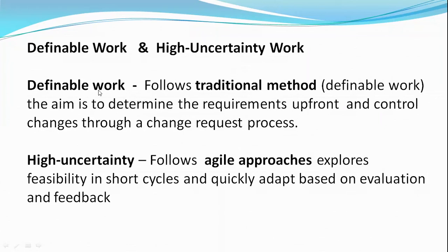So for definable work, I said, when the requirements are very clear, then you are going to go by the traditional method, where you determine the requirements upfront. You know what exactly is required. For example, you're going to construct a house, right? You know the square feet of the house, how many rooms are going to be there, and the size and shape of each of the rooms within the house. There may be a few uncertainties, but on a larger scale, you know what exactly the requirement is, right?